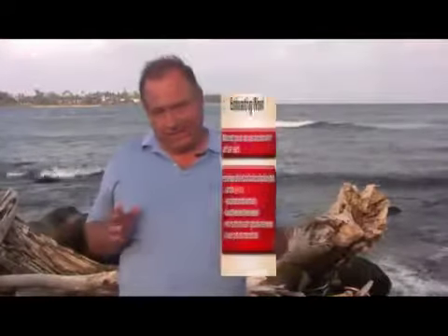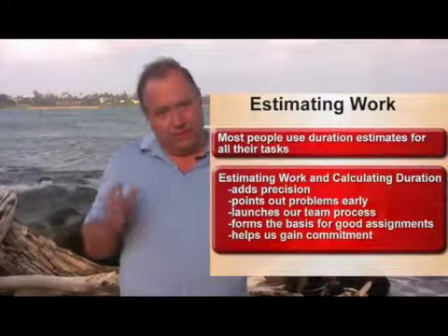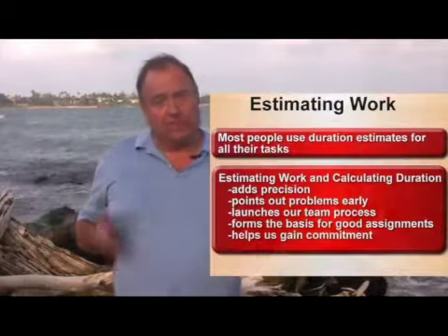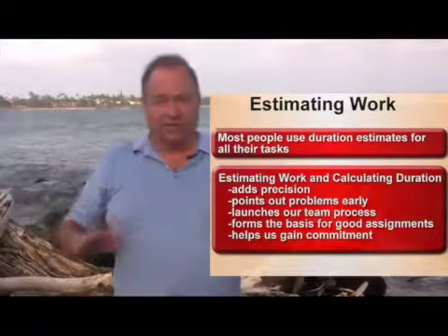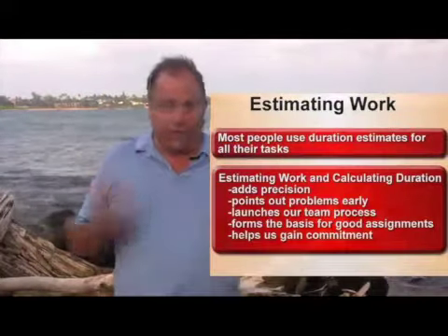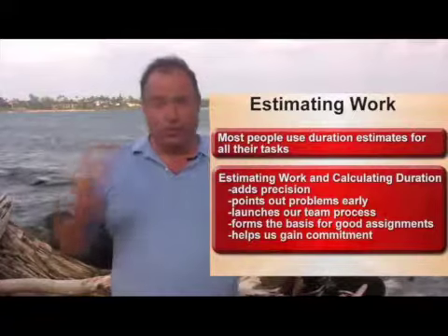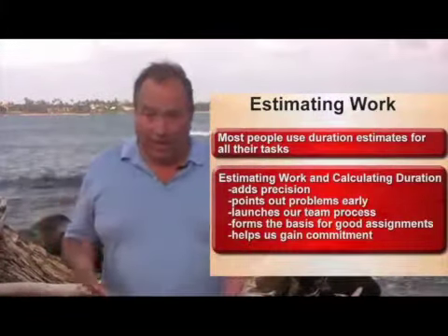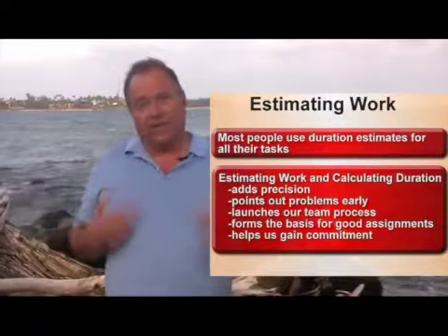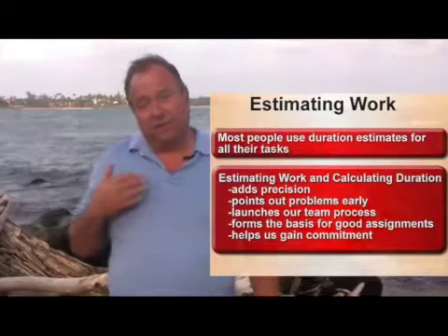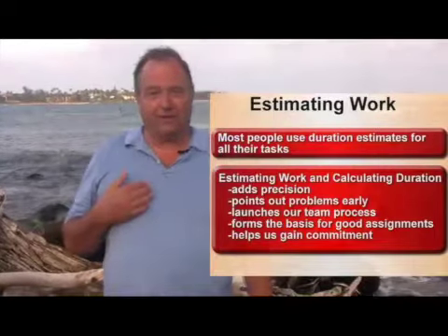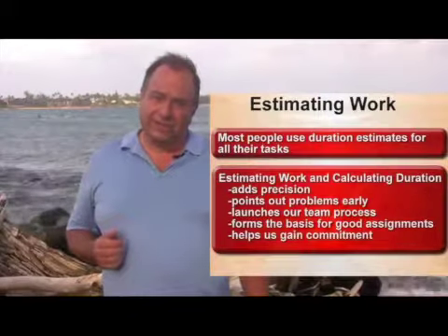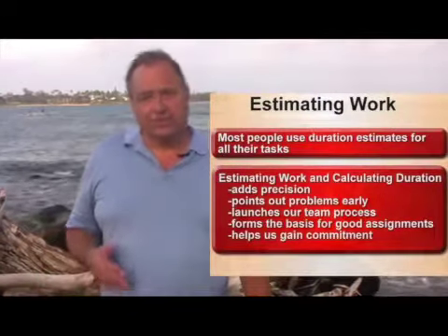We'll start with estimating. Most people use start and finish dates when they build their schedule, and that is bush league rookie technique. You do not want your project managers using just start and stop dates, and you don't want to use them at a program level. Why? Because if you and I agree on an estimate of my start and finish dates, and I tell you I'm going to be finished by the 30th of June, when are you going to find out whether I'm going to finish on time? On the 30th of June, right?